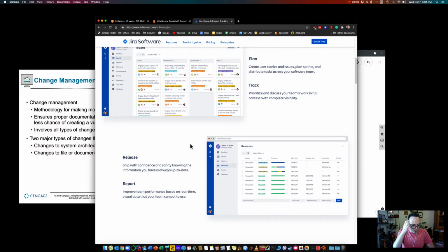I've seen it before in production releases for a company I used to work at full time. Part of their planning was, okay, first, has it been approved? Yes, it's been approved by whoever or what level needs to sign off on it. It has all the details. It's been tested. Now, what's the plan to roll back if it still breaks? It doesn't matter how much you test.